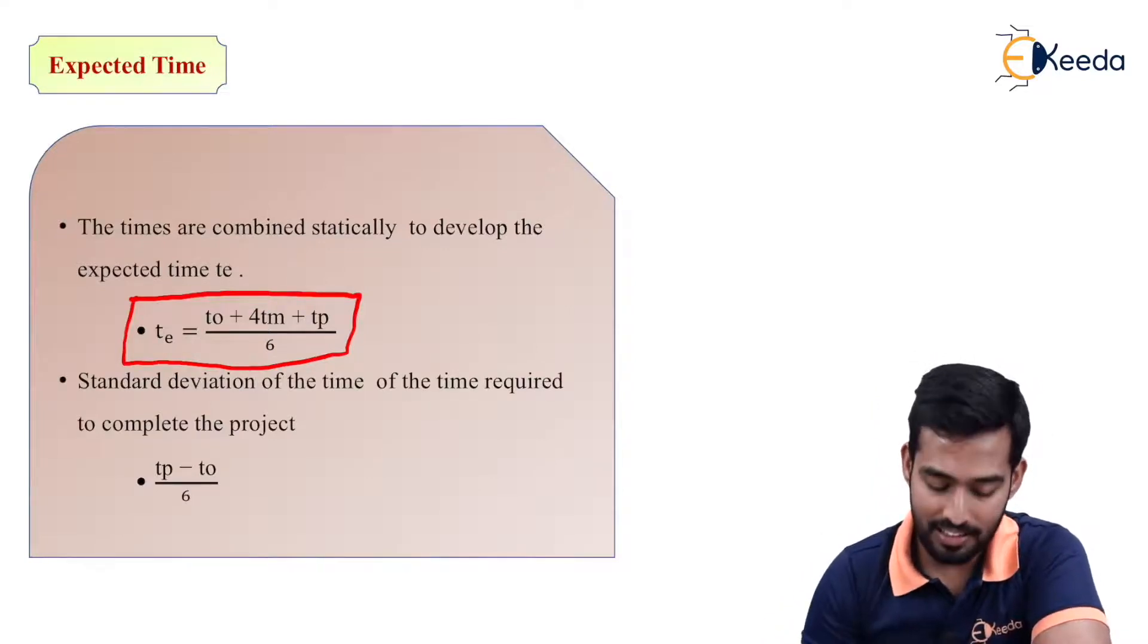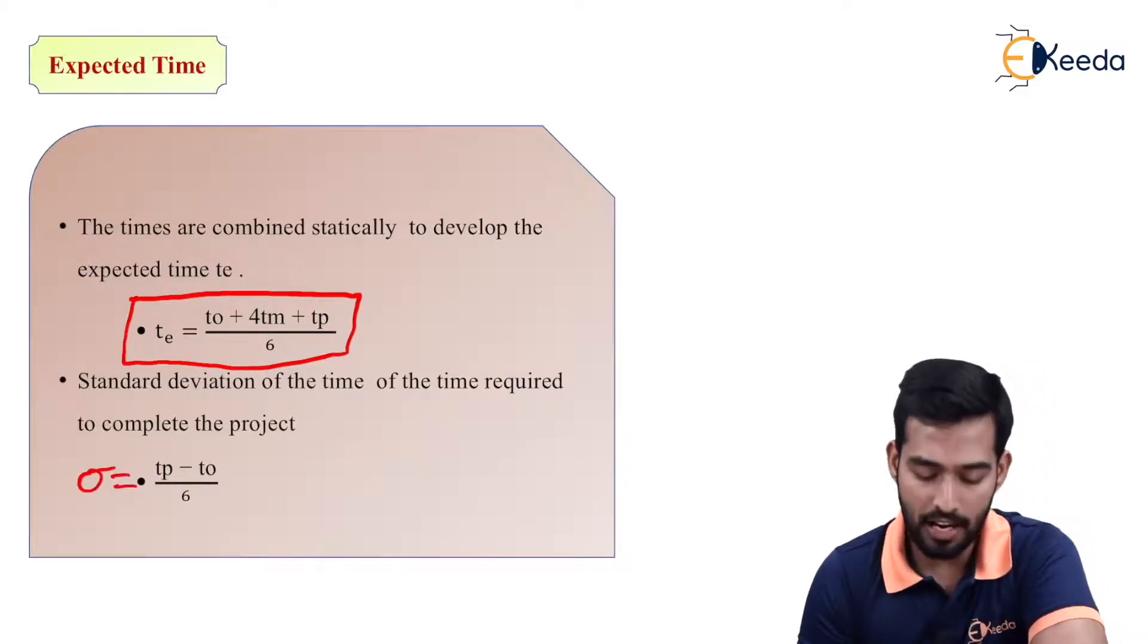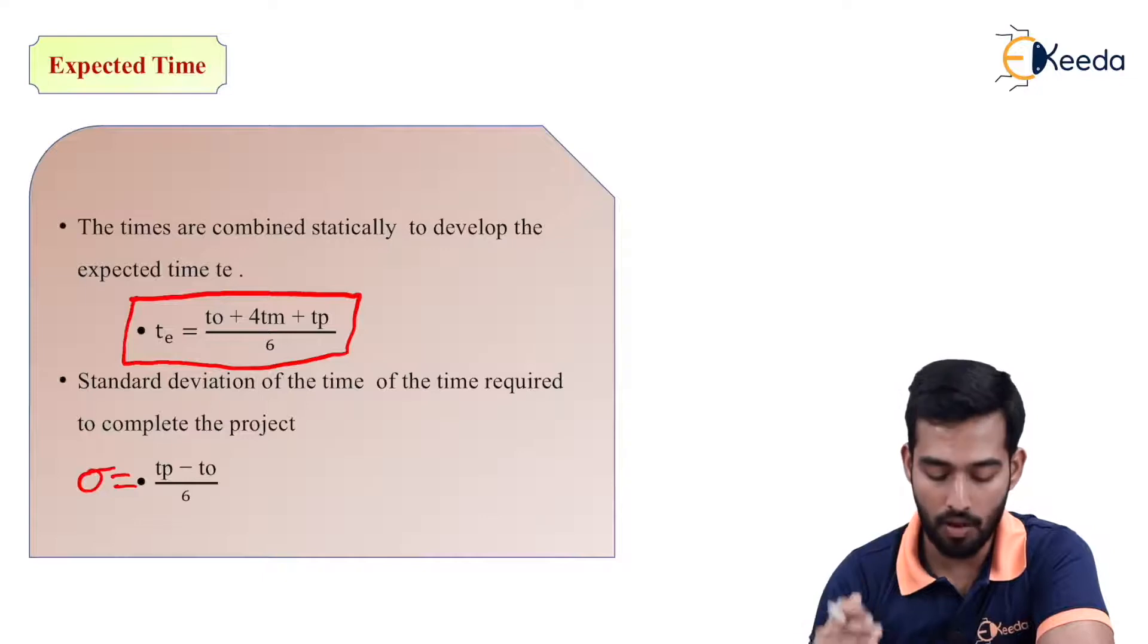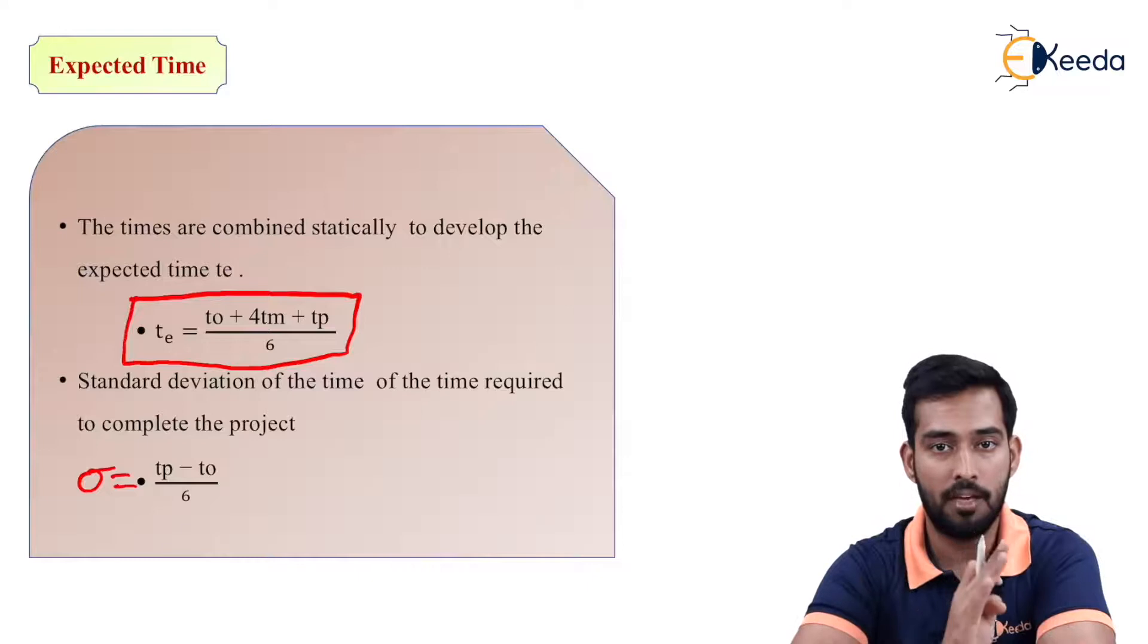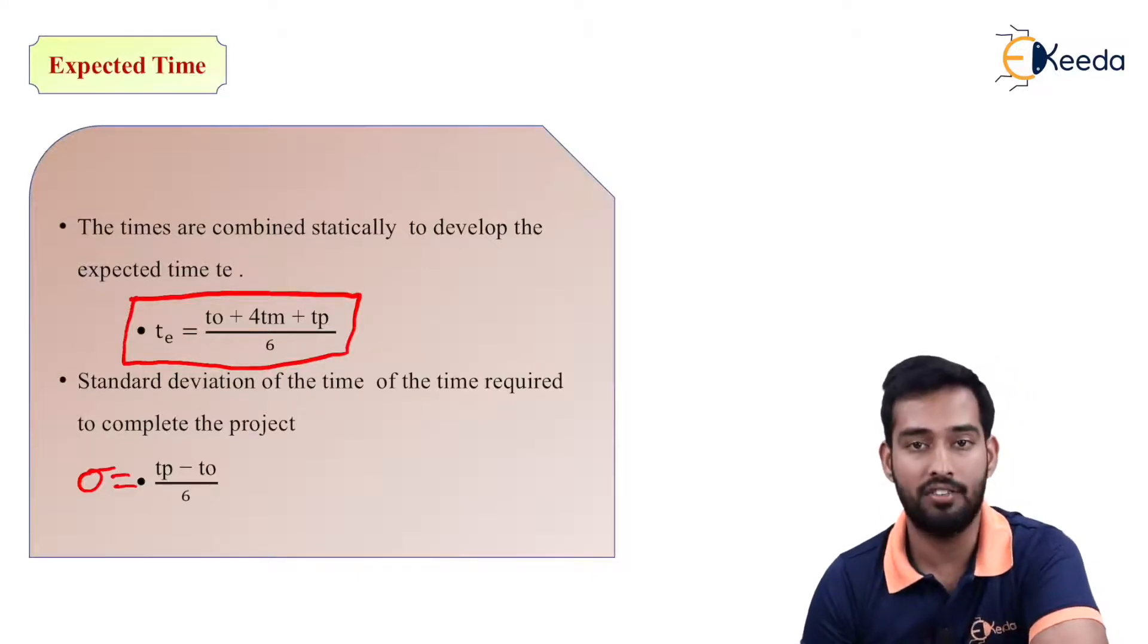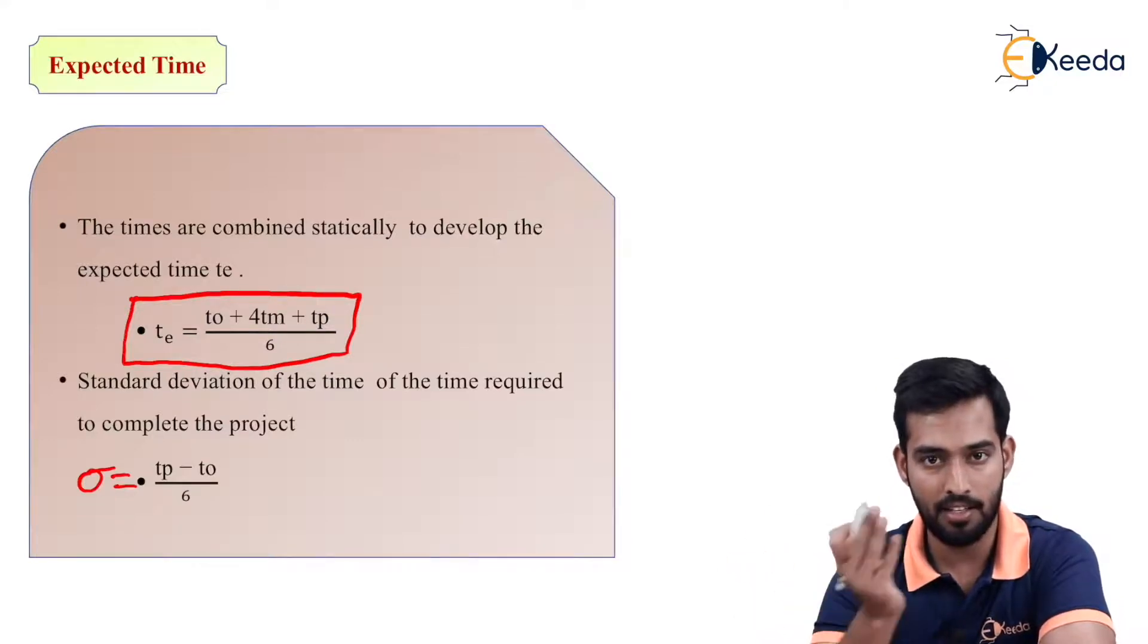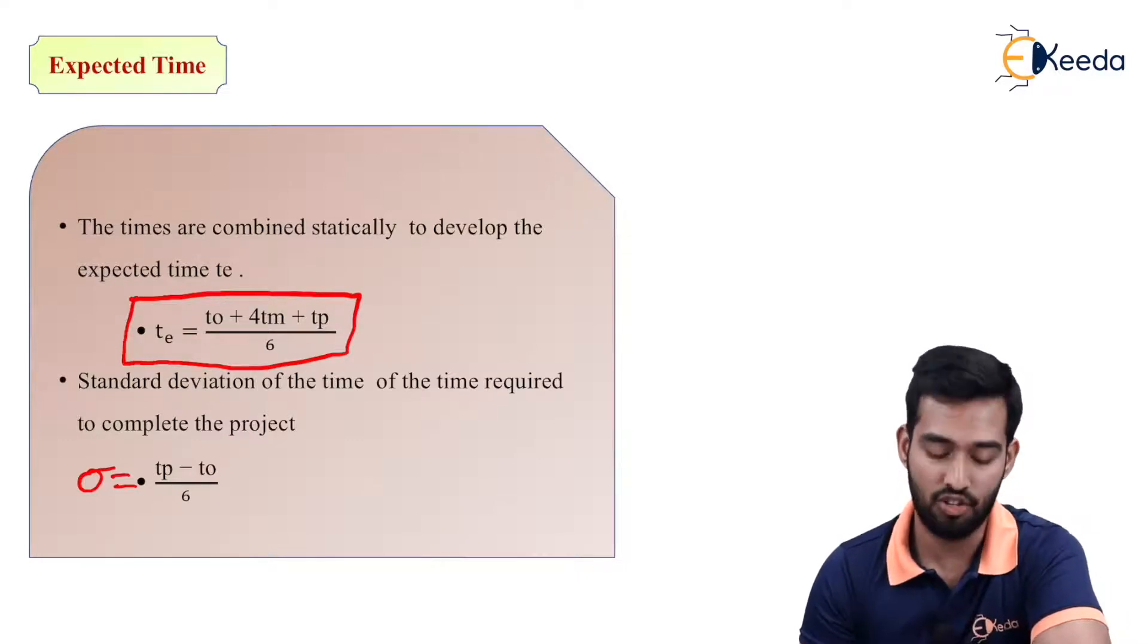Now next is standard deviation. You can denote it by sigma also. So standard deviation of the time of the time required to complete the project is TP minus TO upon 6. That is known as the standard deviation. Pessimistic time minus optimistic time upon 6 will give us standard deviation. As we know pessimistic time will be higher and optimistic time will be lower for the particular activity. So longest time minus minimum time upon 6 will give us standard deviation.